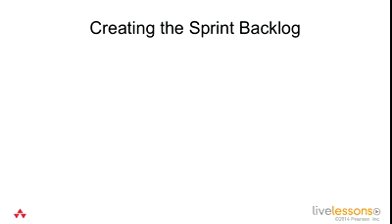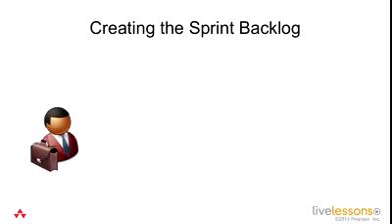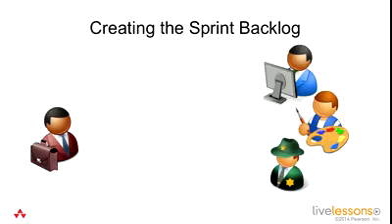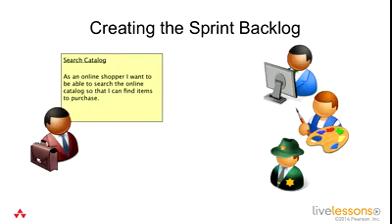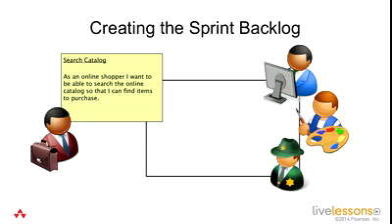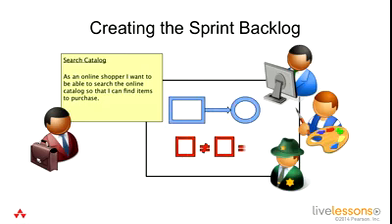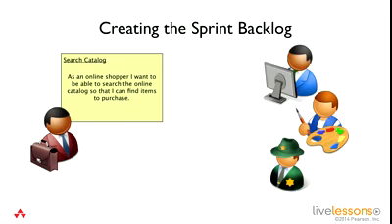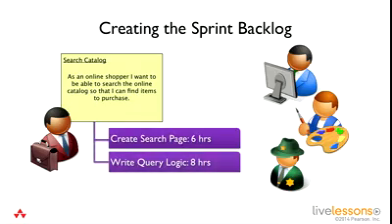So when you're creating the sprint backlog, you want your product owner and your Scrum team in the same room. The product owner is going to present the product backlog items that they've decided to commit to, answer any qualifying questions, and then the team will have a discussion and design. They'll talk about how they're going to implement some details, what they're going to test. They've been doing this hopefully with grooming, but now we're getting in more detail because we're actually going to start building this sprint. Once you're done with that, they should actually start breaking this out into small tasks.